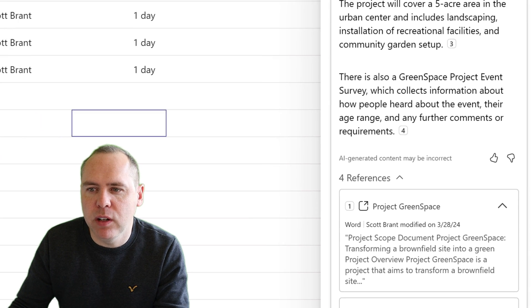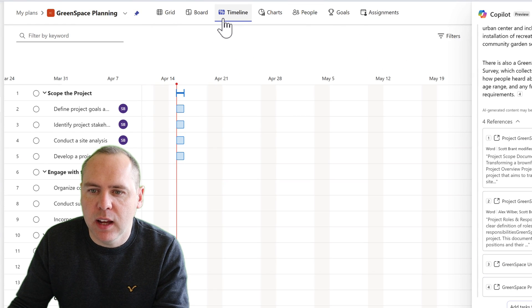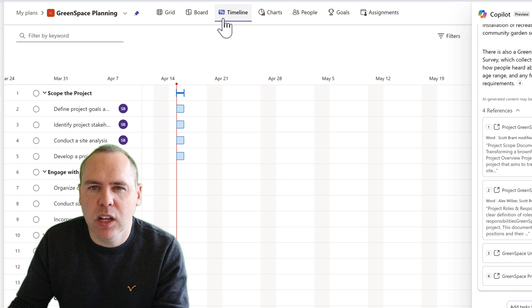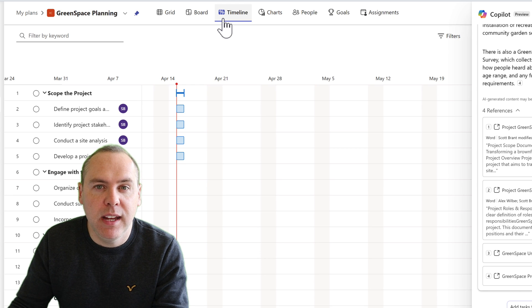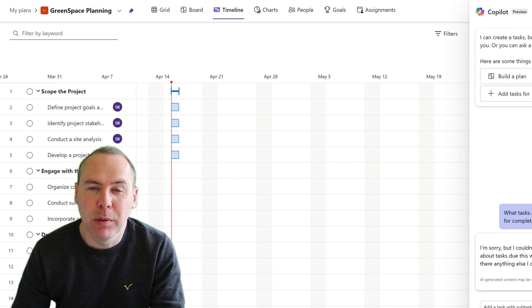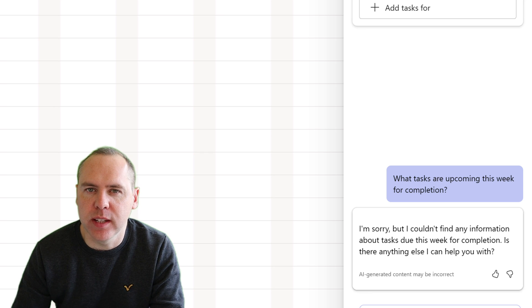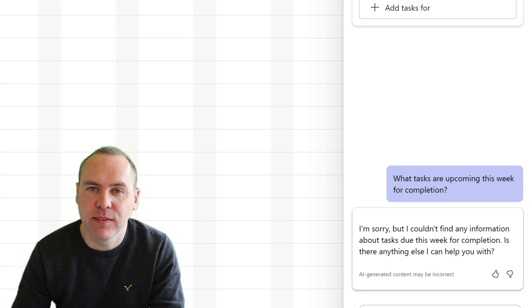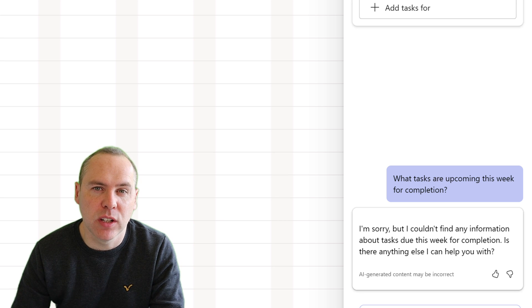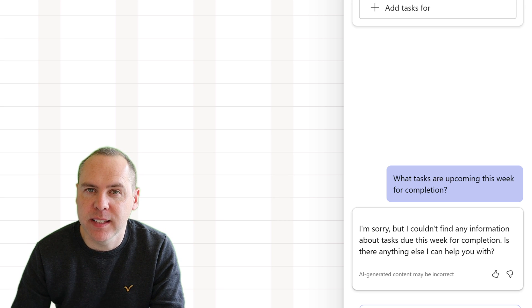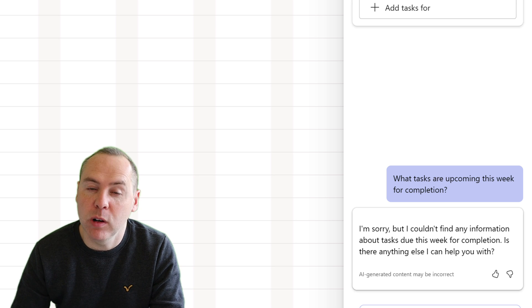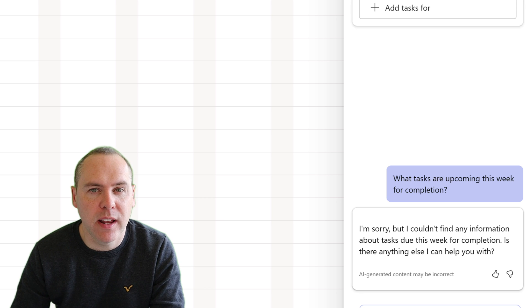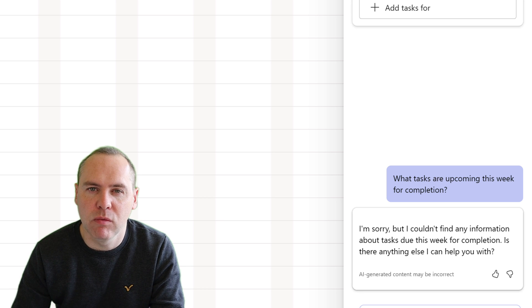Likewise, if we looked into the additional areas around the timeline, and I was to also ask it questions, we'll find similar results. Let's go and ask it around planning to understand when the tasks are upcoming, and if there are any tasks coming up this week. But in a similar way, we find the same answer. There are tasks that are due this week. But yet again, Copilot can't identify those tasks in the plan. So once again, a bit of a big limitation. We would also want it to capture information about tasks and when they're due. Asking a question about overdue or upcoming tasks would certainly save us a lot of time. But as yet, the Copilot experience can't deliver that to us right now.